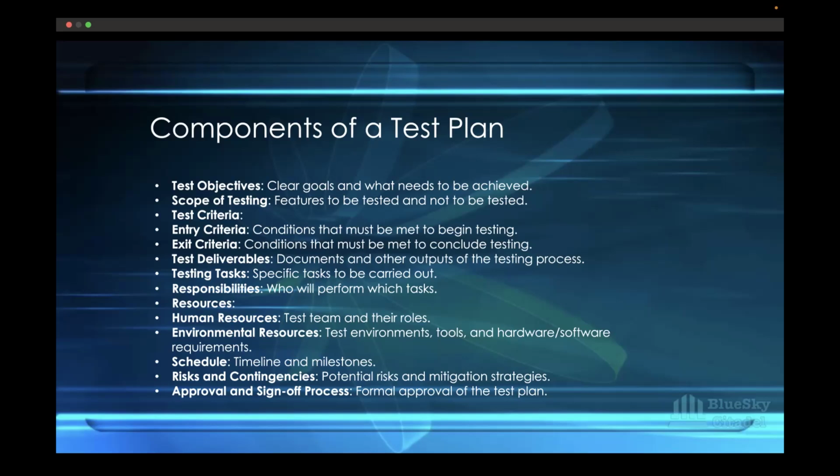So before you complete your testing, you need to have a test report. The test report outlines the number of tests, all the test cases that were completed, the bugs that were raised, the ones that were fixed, the ones that were deferred, the ones that will be moved to next sprint.